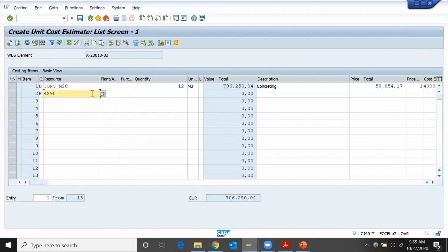In your project you might have several types of objects like concreting. If you are doing flooring, flooring is different for kitchen, flooring is different for toilets and bathroom, right? So you will have to give different treatment. That's why, to sum up the cost for particular objects, we use base planning object. If you want to compare it to something closely, we can talk of base planning as a BOM. Under the BOM of a finished good, you have a sub assembly.